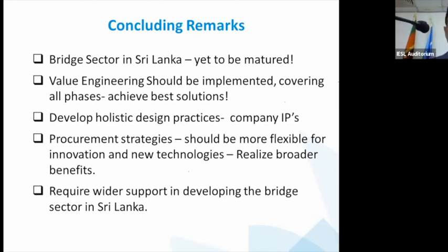And I also wanted to say something about procurement strategies. Without policy, without procurement, nothing can be done, right? If you don't get the right specification written, you won't get the benefits. And it's very difficult to implement changes later if you have already signed the contract. So a lot of emphasis should be placed before that. That's where the expert knowledge should come in.